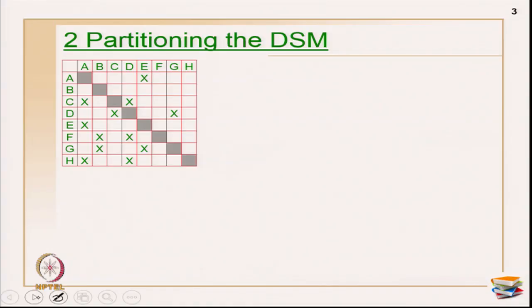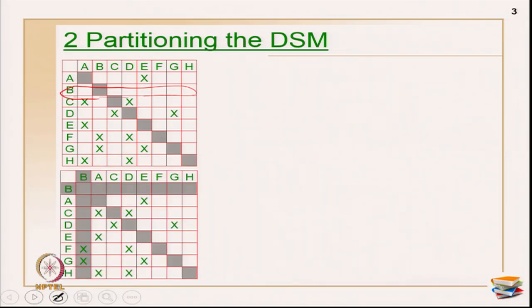Now, to do this, primarily you have to identify the independent and the dependent steps in the first go. How do you do that? You have to literally see whether there are any empty rows and columns. First, I am going to look for empty rows. Where are the empty rows? For example, activity D has a completely empty row here. Empty rows imply they are the starting activities.